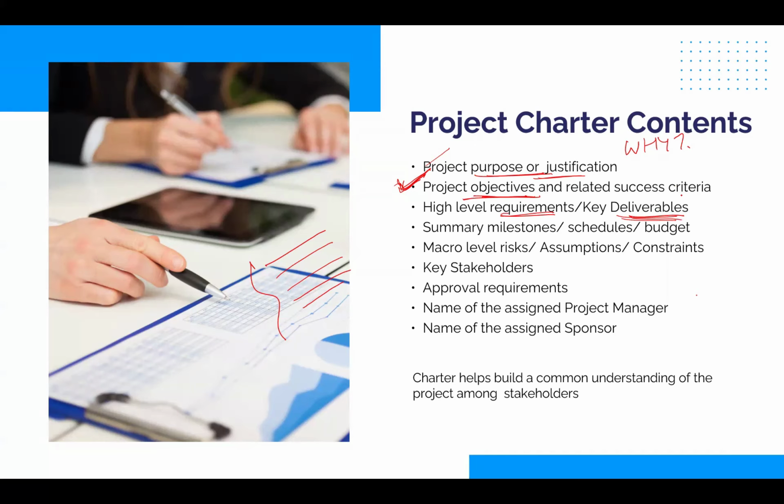Look, we don't want the laundry list of deliverables here. Just state these are 3, 4, 5 key or major deliverables in the project. Those can be defined in the charter. Then time and cost. Same thing. If you ask me, when is the detailed schedule developed in a project? That's planning stage. When do you put up a budget? Again, planning. Initiation is too early.